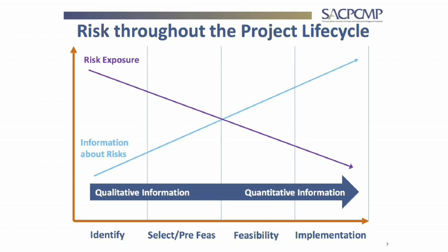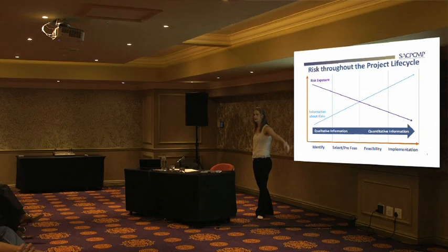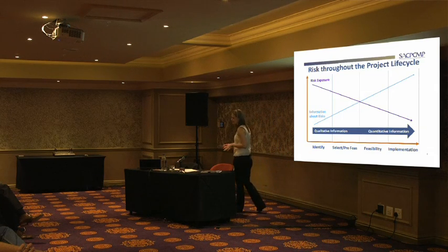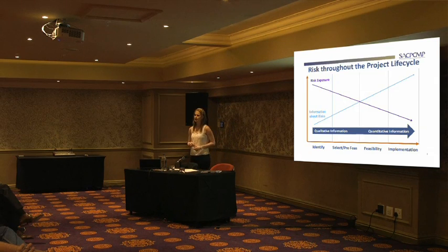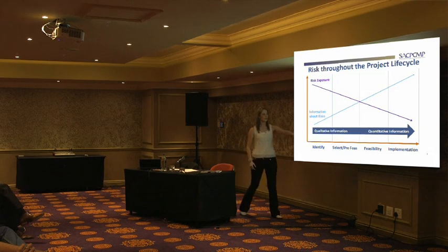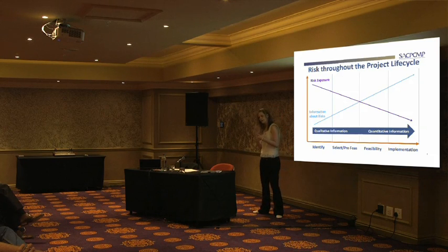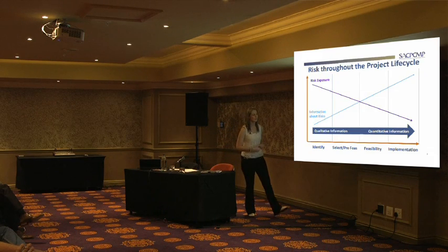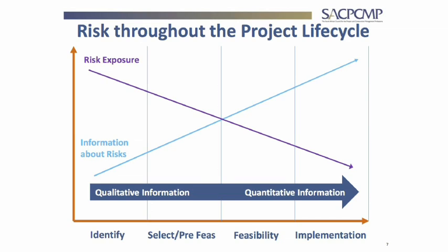So basically, we will do qualitative risk analysis, and it will roll over into quants. Yes, we can do quantitative risk assessment at a pre-feasibility stage and at an estimating stage, but the information we have at our disposal is quite little, because we don't have the design in mind yet, we're not sure what budget we want to spend, we're not sure what timeline we want to have it done by. Because the information is very little, it's very difficult to always do a quantitative. So we do qualitative, we identify just the risks without any monetary value on it, and just say, these are the risks we face.